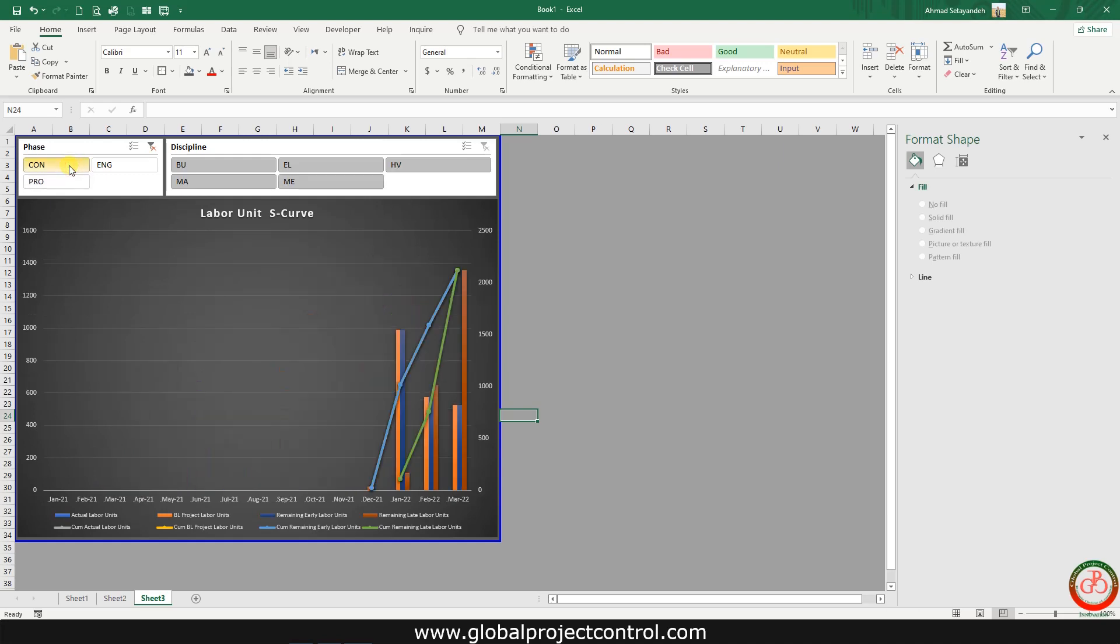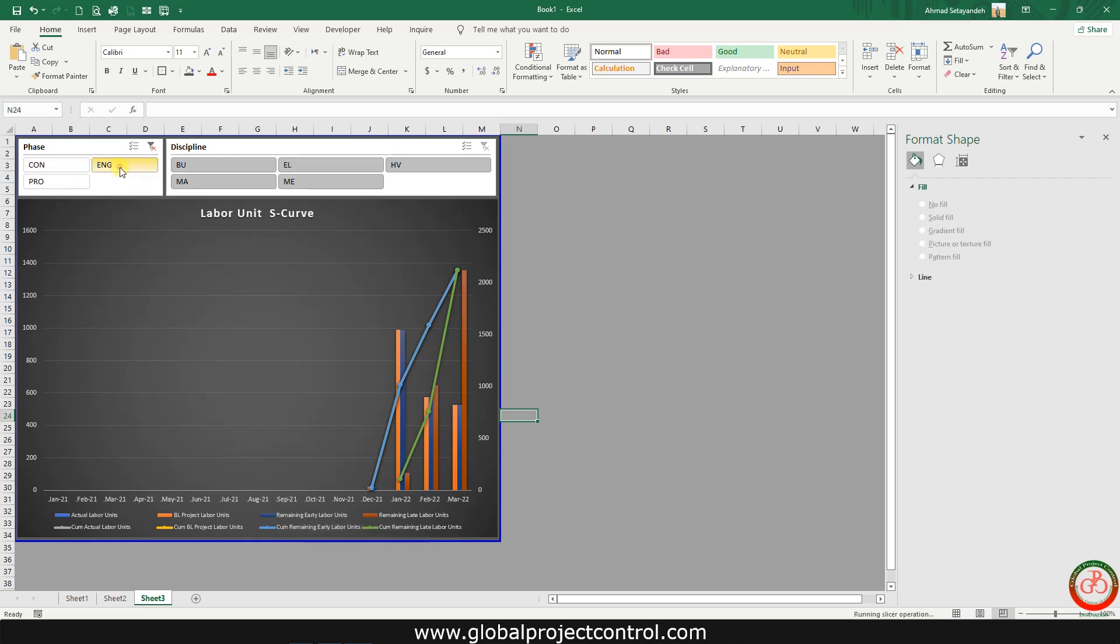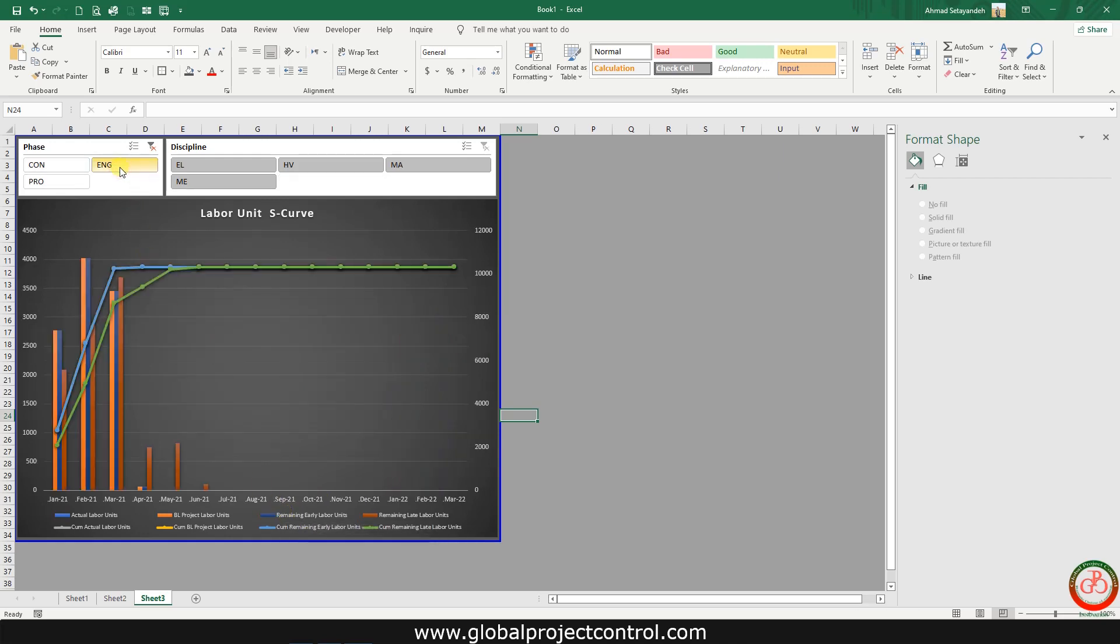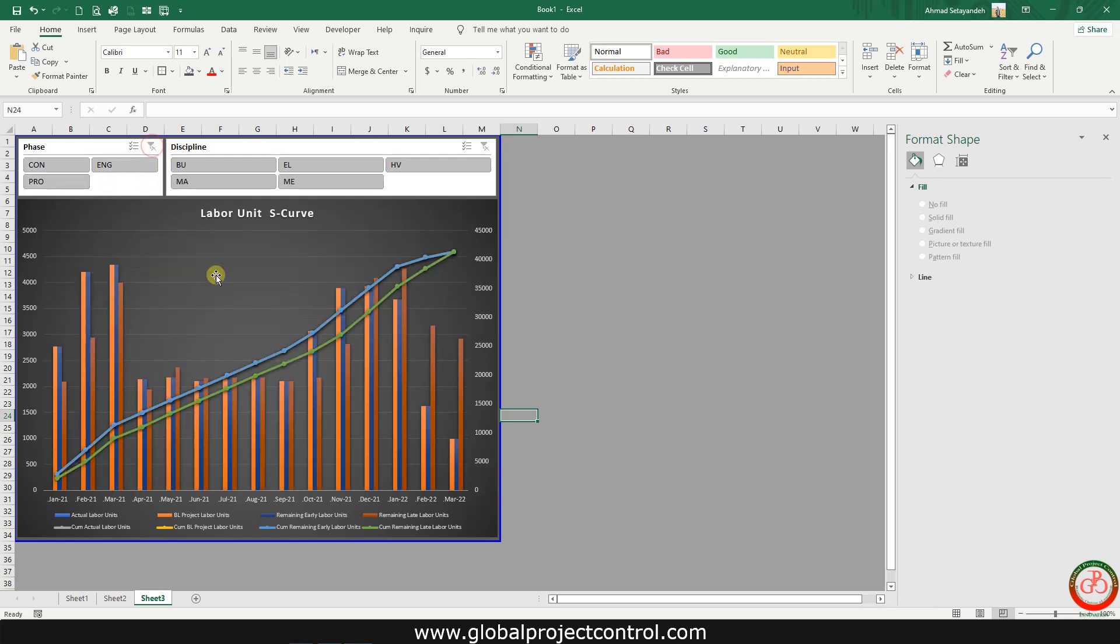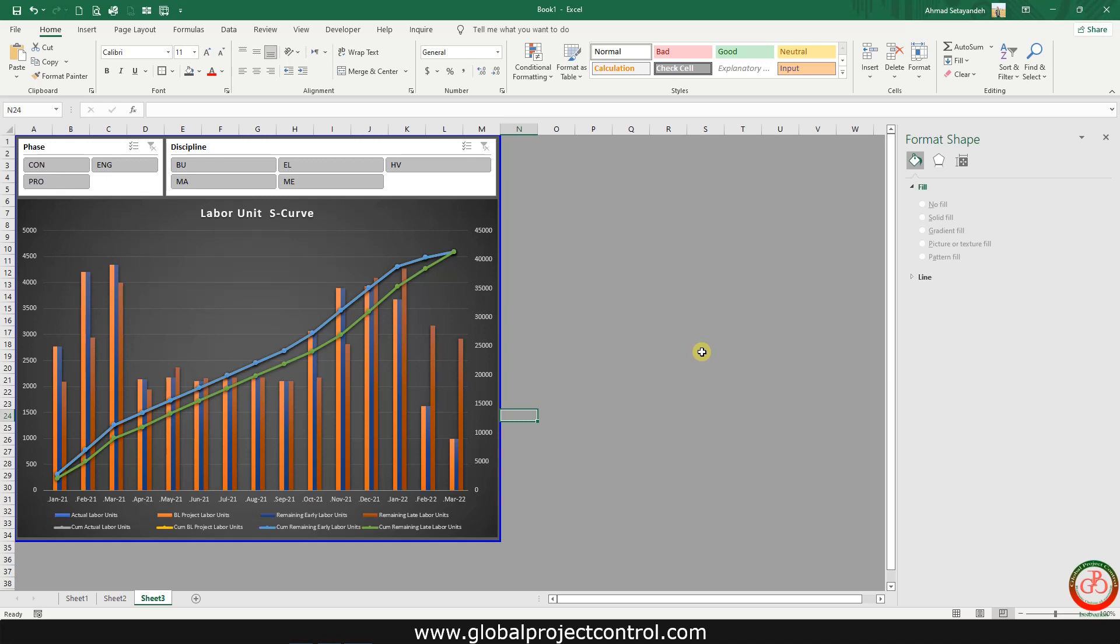If I filter the construction, then you can find the information on construction. And this is for engineering. All the S-curves including early and late will be presented and you can find all the information over here. You can find interactive S-curve by this pivot table.